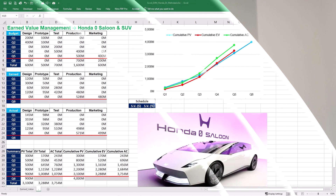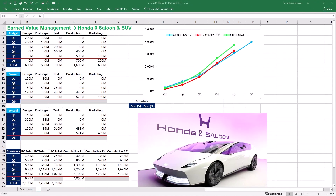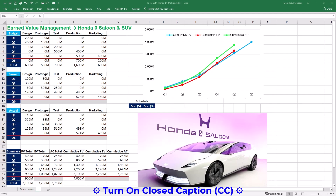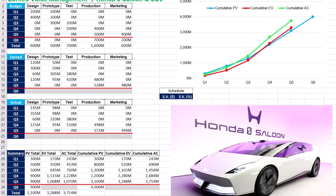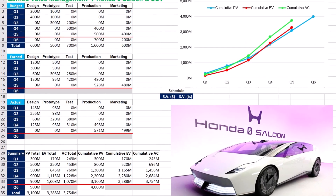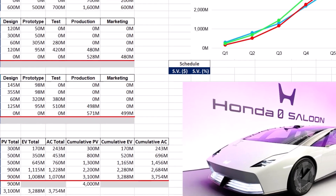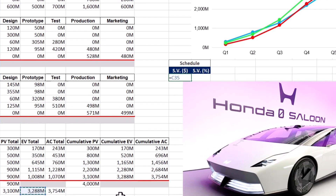Step 3 is calculating cost and schedule variance, cost and schedule performance index, and estimate at completion. Earned value or EV converts work progress into cost units, which allows for an integrated comparison of both planned value and actual cost. For an objective measurement of progress, we gauge the value created against the time and money invested. The metric to use is schedule variance or SV in both dollars and percentages — SV shows how fast the project is progressing and is the difference between total earned value and planned value at the review or status date. A positive SV indicates that the project is ahead of schedule with no delay risks.